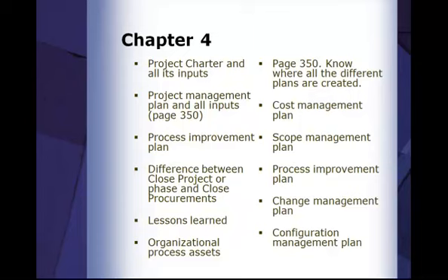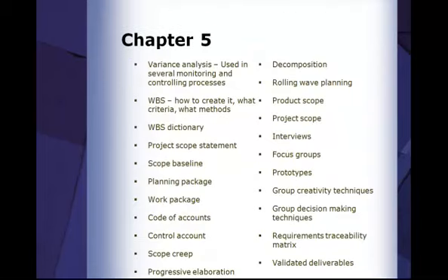But at the end of the day, when you look at the outputs of perform integrated change control, remember you're going to see the change request updates. So it could be a change request status update to indicate that it has been accepted and it's going to be implemented, or it's being rejected. Very important to understand that you're not going to see rejected change requests in perform integrated change control. Stuff like that. And that's why you need to know the inputs, tools and techniques and outputs of any process in great detail. Chapter 5 is all about scope management.